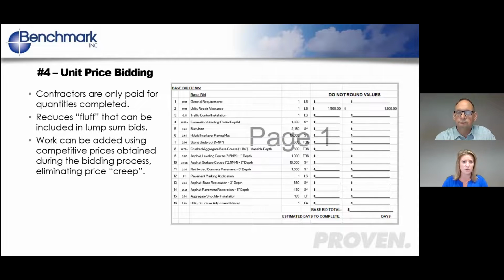And it also avoids any kind of price creep that might come up with a change order. Sometimes you're under the gun, you've got to get a change order approved, and the contractor's got to put something together right away. And so they're just going to throw a number at it. So having unit prices can help you to better plan for that change order in the field.